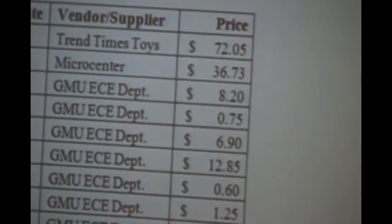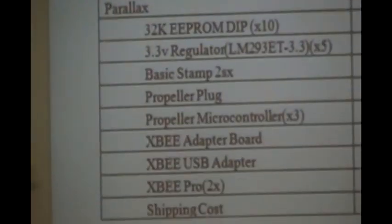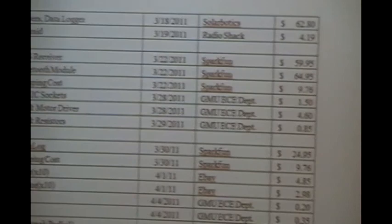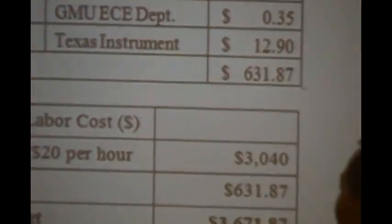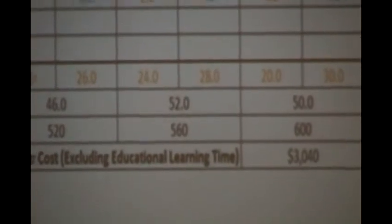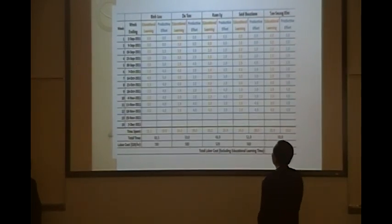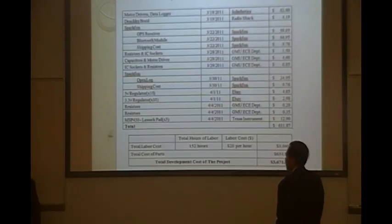Now we talk about the budget. We have a lot of materials but it's not too expensive. The total material cost was mostly only $461. And this is the labor - we have around 50 or 60 hours per person for the project. So you could make a low-cost product. For education and learning, the total cost is around $2000. So the total for our project is around $2461.